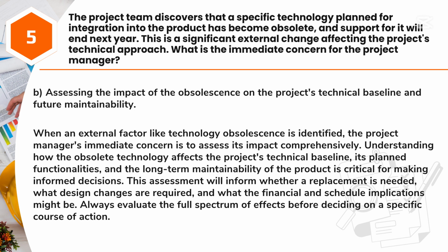Answer: B. Assessing the impact of the obsolescence on the project's technical baseline and future maintainability. When an external factor like technology obsolescence is identified, the project manager's immediate concern is to assess its impact comprehensively. Understanding how the obsolete technology affects the project's technical baseline, its planned functionalities, and the long-term maintainability of the product is critical for making informed decisions.